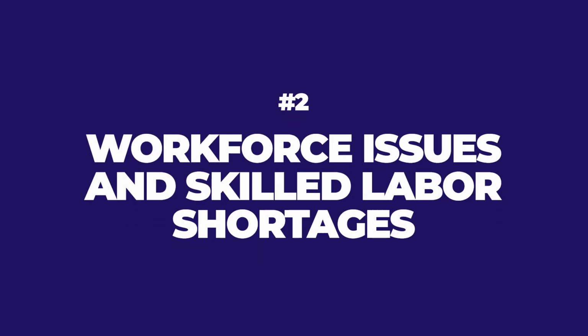Number two, workforce issues and skilled labor shortages. This is a problem, but I'll tell you what, it's not because of what you think. It's because we do not utilize our resources properly. I'll just give you this number. On any given day, there's at least 80 workers on a construction project that are not needed, that are doing treasure hunts, that are walking around, that are waiting, that are not doing work because it's not ready, because there are roadblocks in the way, and there are workers doing rework when we could have done it right the first time. Everything with our workforce comes down to utilizing our resources properly.